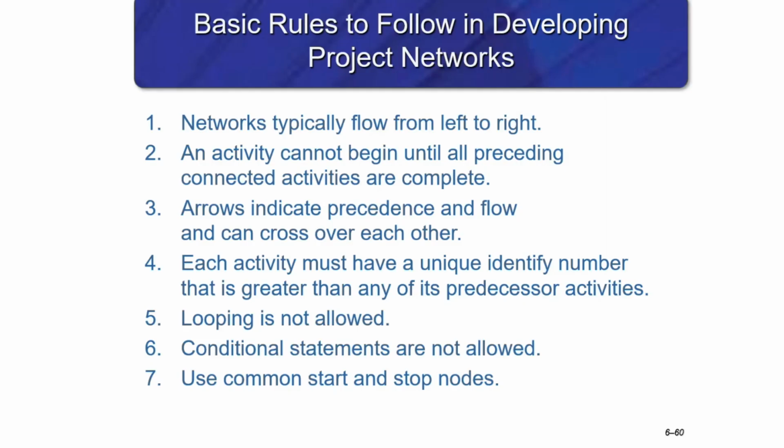So basic rules, some other rules like each activity must have a unique identifying number that is greater than any of its predecessor activities. Looping is not allowed. Okay, so remember this. You can't turn a cycle. You have always to go forward to finish it. Conditional statements are not allowed.